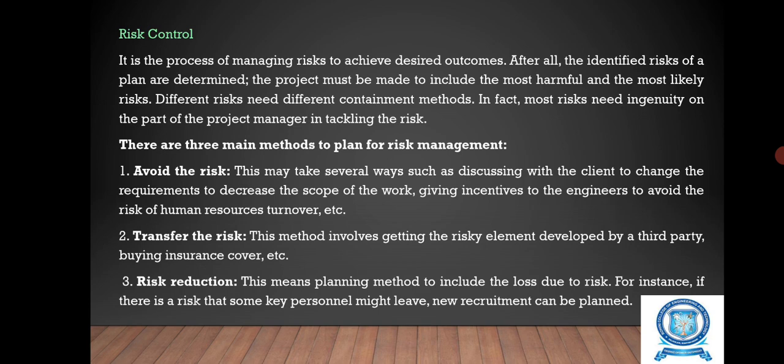Risk control. It is a process of managing the risk to achieve the desired outcomes. After all the identified risks of the plan are determined, the project plan must be made to include the most harmful and the most likely risks. Different risks need different containment methods, and in fact, most risks need ingenuity on the part of the project manager in tackling the risk. There are three main methods to plan for the risk management: avoid the risk, transfer the risk, and risk reduction.